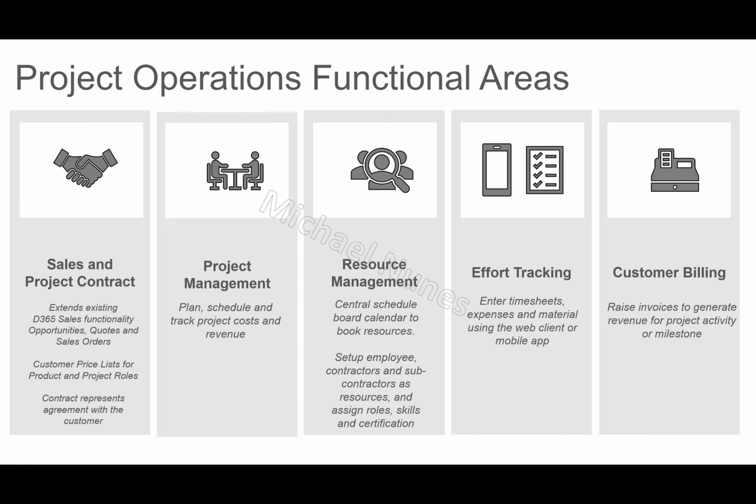There's also effort tracking capabilities where we can post transactions such as timesheets, expenses, and material usage. All of these entries can be processed by using a web client or by using a mobile app. So an end user could be on site and enter timesheets or material usage. We have a customer billing section which extends on the previous entries and allows us to generate revenue for scheduled milestones, timesheets, and expenses that may have been posted.